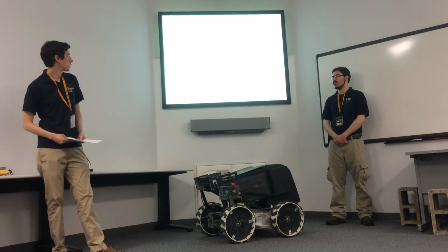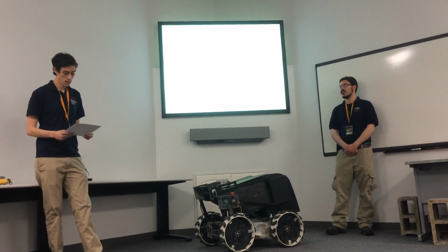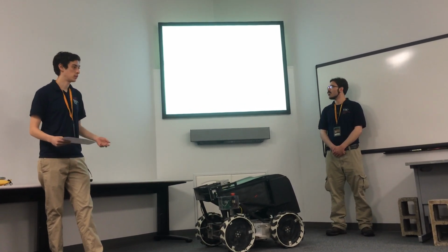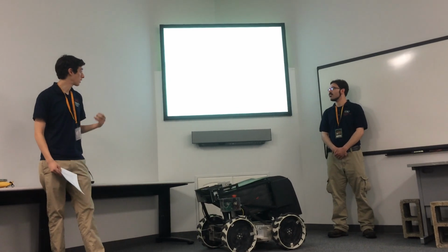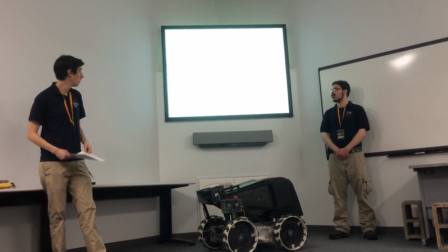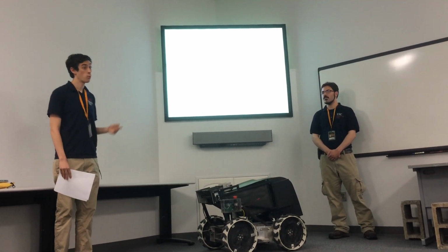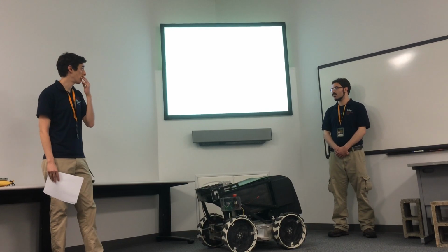Here we have a work breakdown structure. I picked this one out as something that was especially important because it's an example of a systems engineering concept. It will also help guide the following slides of the presentation. Our planetary excavator is broken down into three subsystems. We have a lower assembly, an upper assembly, and hardware.